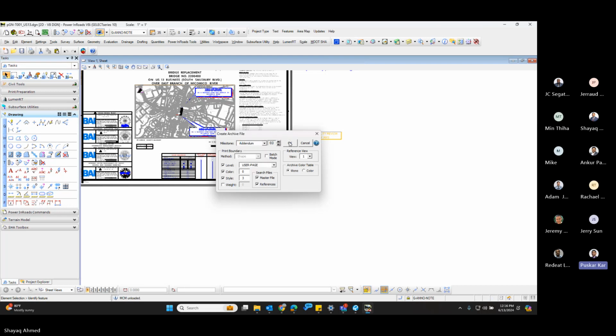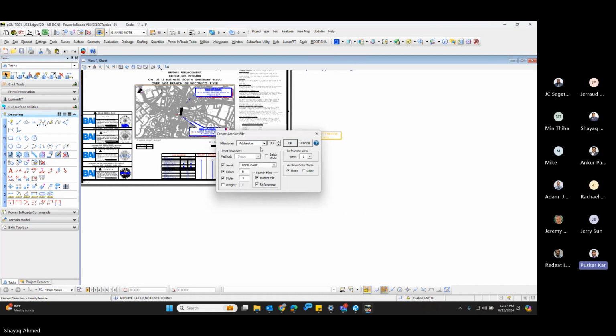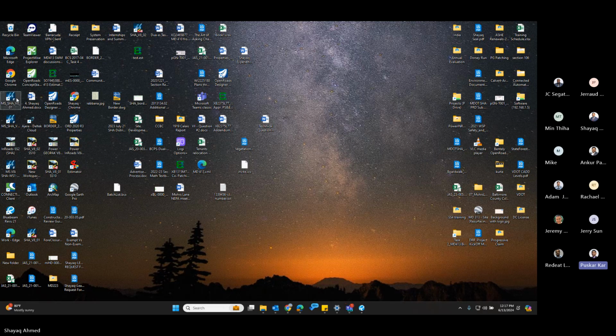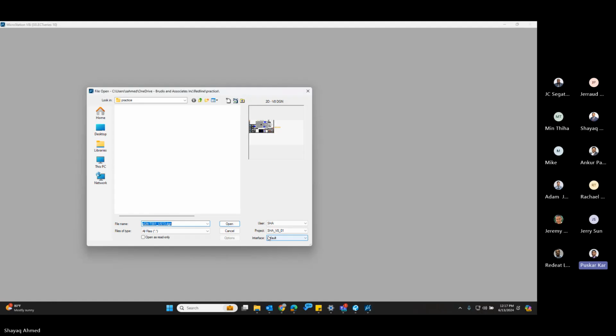The second thing it does is change the line weight and color, and everything will be grayed out. So anything on the sheet that was advertised will be grayed out. The purpose is that when you addendum or redline something, the addendum will come out as black and the red lines will come out in red, so it stands out and it's easier to read what has been changed.